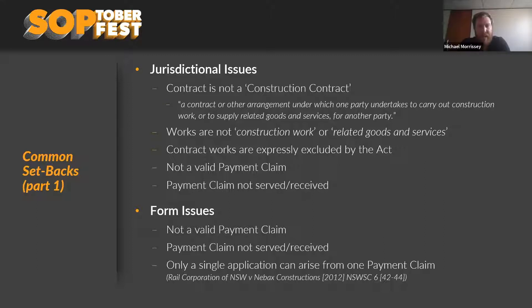The first common setback: the contract is not a construction contract — i.e., it doesn't fit the category of a contract where one party undertakes to carry out construction work or supply related goods and services for another. The work simply isn't construction work or related goods and services. As recently as 9am this morning I was assessing whether goods supplied under a contract fit within the definition of a construction contract.